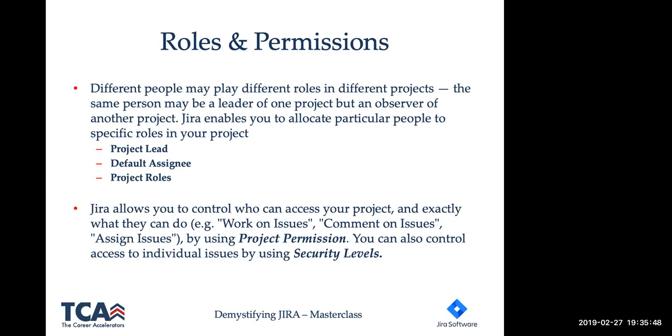So for example, you could have a project lead who would have the ability to add new people to the project, or you could have a default assignee. That means whatever task is created, it goes to that person by default. And then you can also have specific project roles. For example, you could have a project administrator, you could have a business user within the project who, again, will have a level of access.